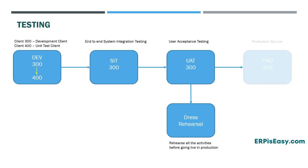Then comes the actual go live. Once the dress rehearsal is completed, the production cutover will start. Transports will be moved to the production system from the UAT system, followed by the data load. Users will be unlocked and they will be able to log in and start executing their business transactions in the production system.